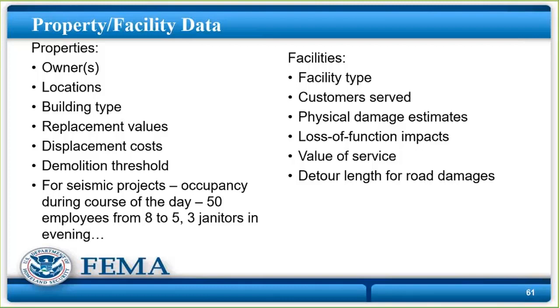So for each property, we need information about the tax lot number, the acreage, what kind of building it is, what square footage, and the age of the structure. Please attach the assessor's report on that structure.